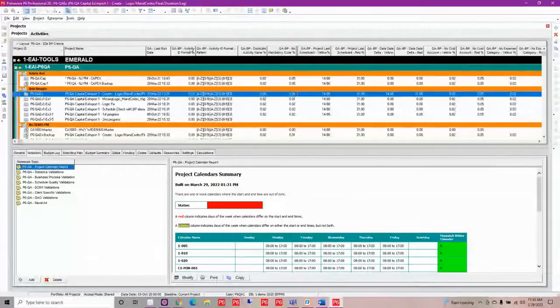So we can see here where I've got my activity ID format, and that showed you how we built that out. The activity ID percent tolerance: 10% of my activities do not need to adhere to this particular format. Now, this might be the case in your major milestones, for example. Maybe you don't put the same type of format pattern on those. Those might be ones that are okay to not be completely adhering to that.